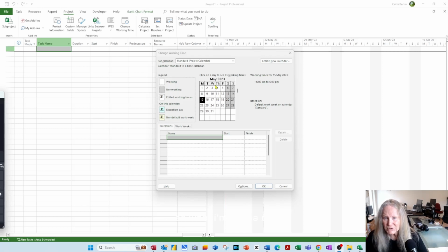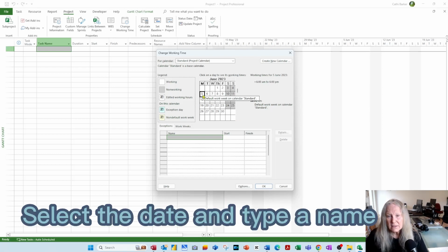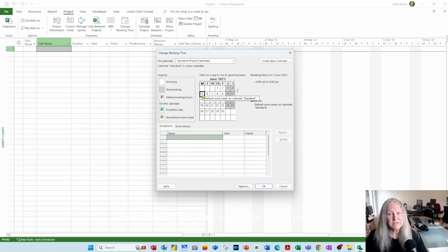So what I'm going to do, and of course there's more than one way to do this, this is just the way I like to do it, is I'm going to scroll down to June, I'm going to click on the 5th, and that way I can just visually check it's a Monday. Now, Monday the 5th of June is King's birthday, so that's considered an exception. So this is when we use the exceptions tab, and I give it a name, King's birthday.